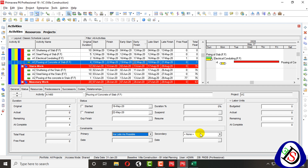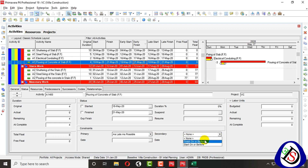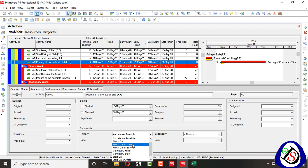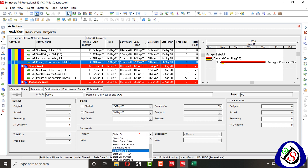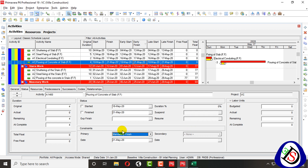I have covered Mandatory Start and Mandatory Finish. The last one is As Late As Possible — when applied, no specific date is set; it remains as scheduled. For secondary constraints, they can be applied to: Finish On or Before, Finish On or After, Start On or Before, and Start On or After. Secondary constraints cannot be applied to Start On, Finish On, Mandatory Start, or Mandatory Finish — those four fix both sides so they don't allow a secondary.